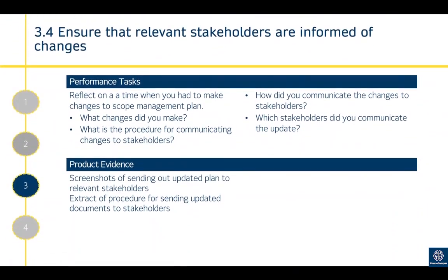Criterion 3.4 is to ensure that relevant stakeholders are informed of changes — there is a similar criteria in the communications unit so there's some overlap. If there is a change to the project, it's important that all relevant stakeholders are informed. Anyone working on that activity, finance if additional funding is required, people conducting the activity who now have extra days, and resource owners if equipment is moved — all need to be kept up to date. If they don't know, they will make decisions based on outdated knowledge, which can cause a lot of problems for the project.